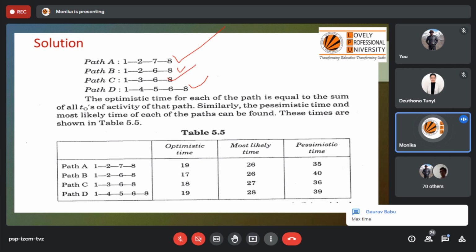So we can consider it as 28 and a half days required to complete the project. So it is the longest path, right? Or the maximum duration we need to spend over this path. So this is the critical one. I hope it's clear. Now I'll continue with the next topic.